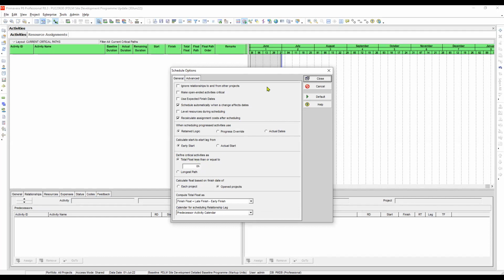But if you look at our schedule, we are ahead by 5 days. So if our total float is less than 0, let's say -1, -2, lower than 0, it will be critical. But since we have 5 days above 0 in our current schedule, there are no critical activities present. That is why our current critical path window is empty.